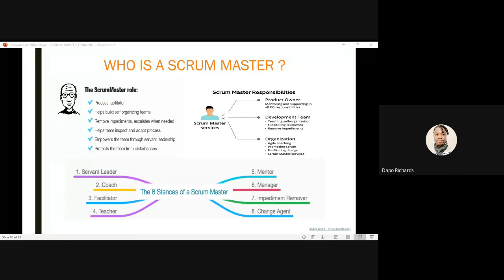But in Scrum itself, you wouldn't have a role called BA. What you would have is product owner, and he's going to be the one responsible for doing the explanation. If you're using a tool like Jira, the product owner would have done his product backlog and he would have left it there. The development team then goes there and prepares the sprint backlog.